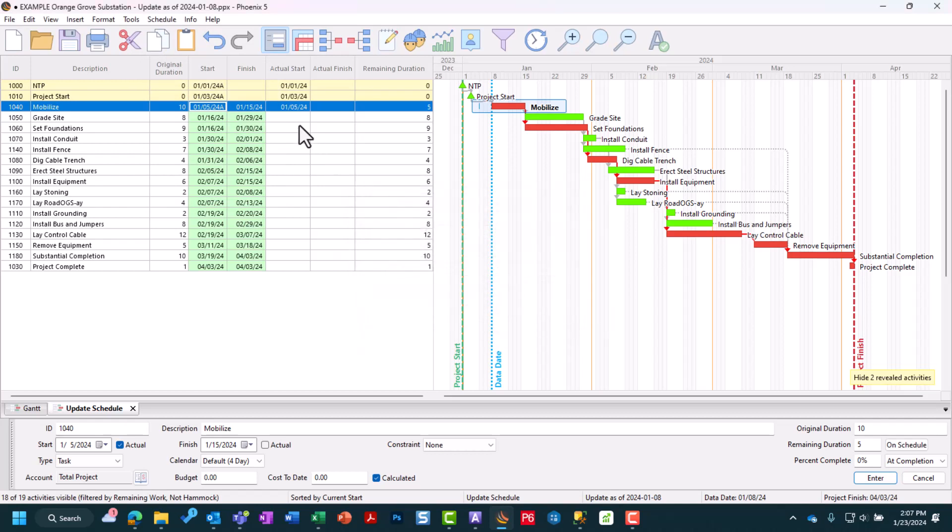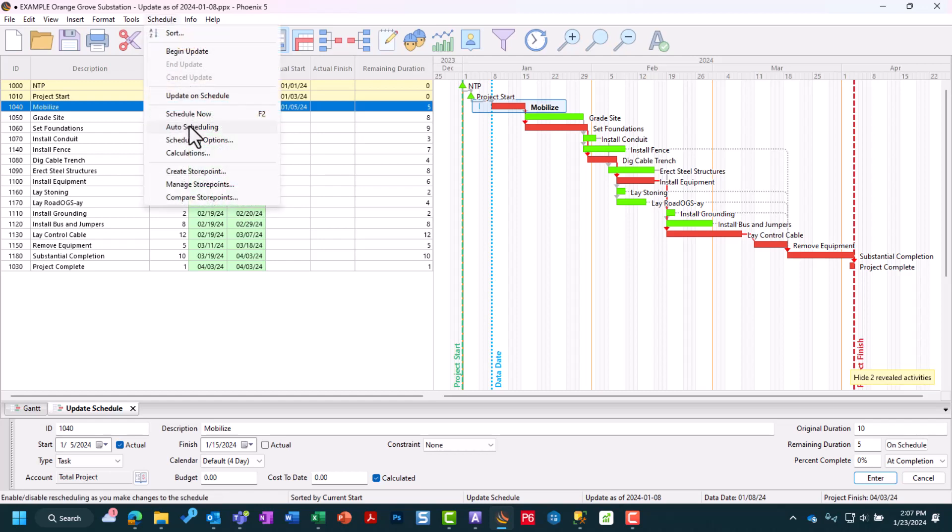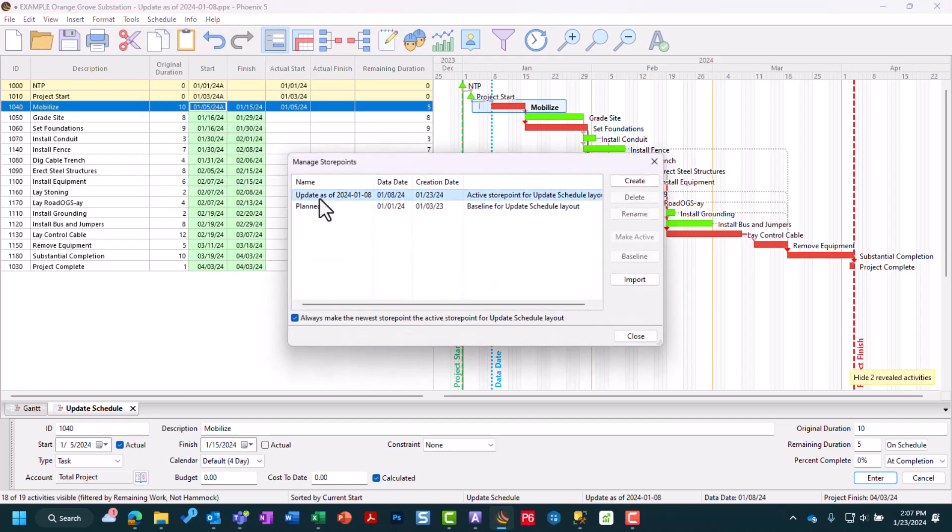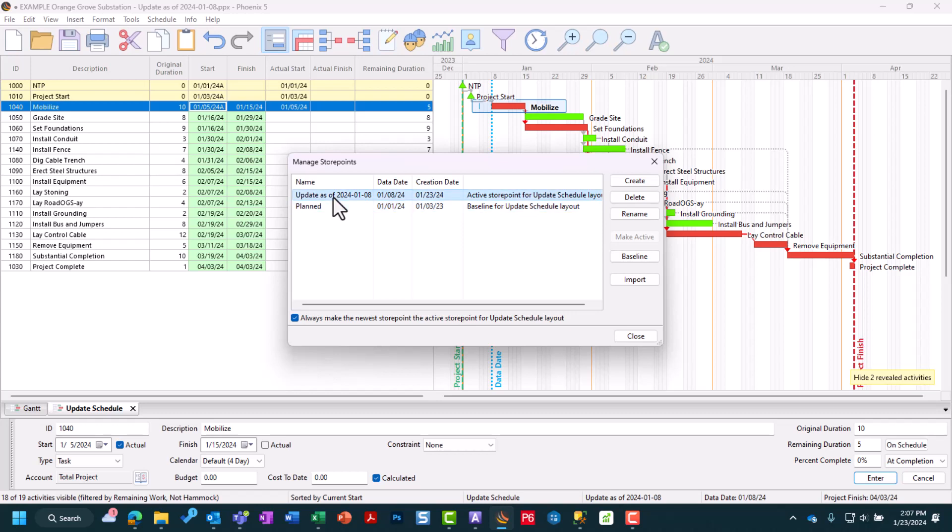Then update your activities as follows. The nice thing is, as you're creating projects along the way, each of them are going to be different iterations of your project timeline. So if you ever need a backup or something goes wrong and you need to restore a previous version, you'll have those projects as backups. You'll also be creating store points along the way. There's another CDP video on store points where we compare store points to current project progress. Think of these like your baselines.